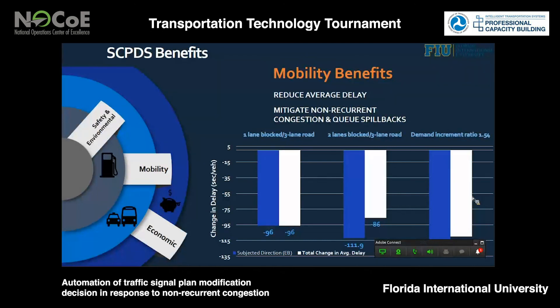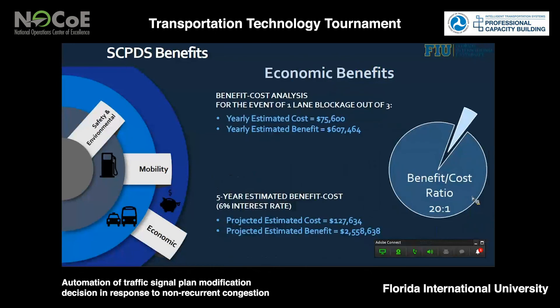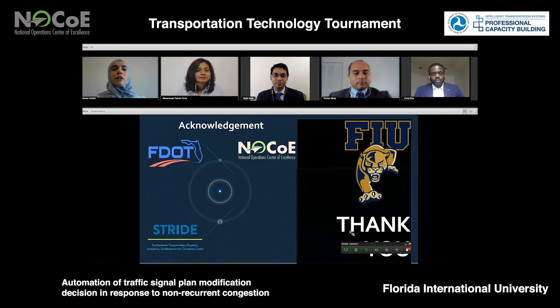Finally, to assess the economic benefits, we ran a benefit-cost analysis using simulation data and the yearly estimated cost of around $75,000. We estimated a yearly benefit of around $600,000. We also did a five-year projection using a 6% interest rate, and the benefit-cost ratio came out to be 20 to 1. Thank you for attending. We would like to acknowledge FDOT, the National Operations Center of Excellence, and STRIDE for their support. Thank you.